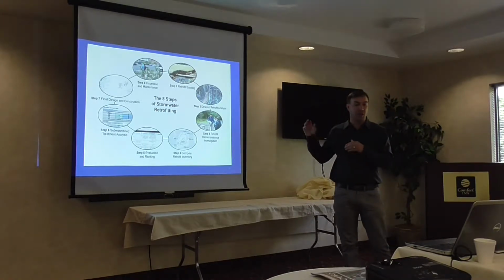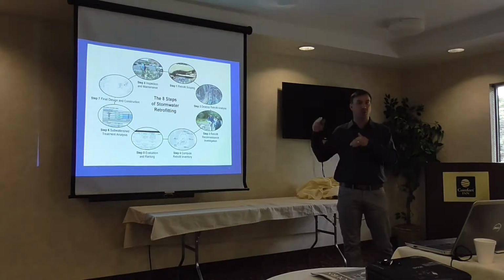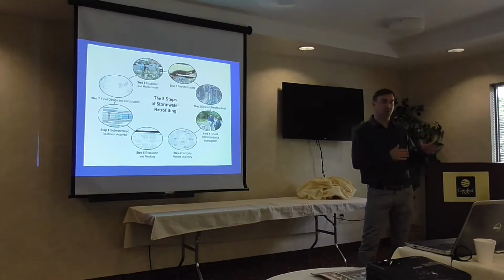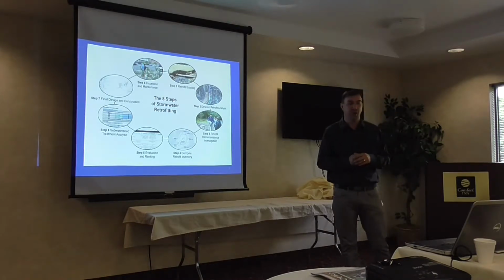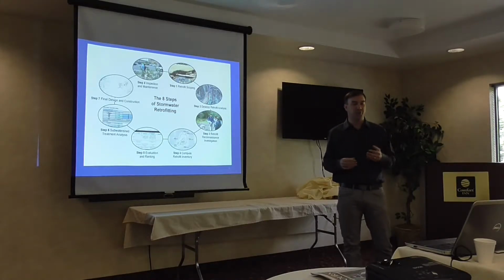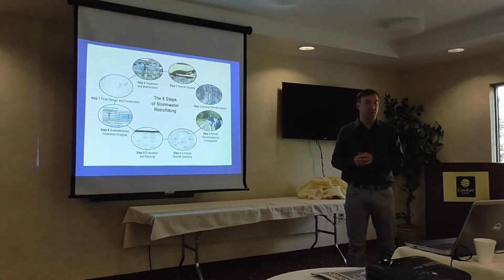You will have maybe a treatment analysis. So we have this group of projects. What do we get for them? How much load reduction are we going to get over time? Then, obviously, as you pick out those top performing projects and assemble the funding, you'll be going into final design and construction.